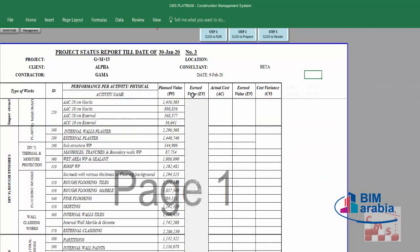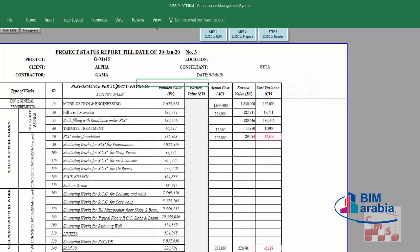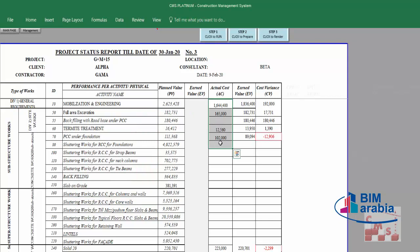Now we have the status report. As mentioned before, we have physical performance for each activity. Each activity shows actual cost, earned value, and cost variance, so we can identify the status and performance of each activity. We can see if we have a delay, a cost loss, or if the project is running over budget. We need to know the causes of any over-budget situations. CMS provides cost status for each activity.